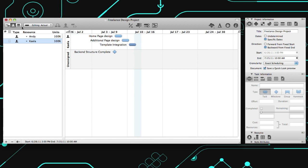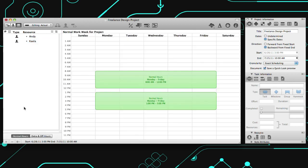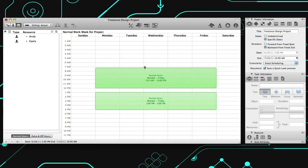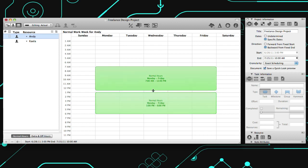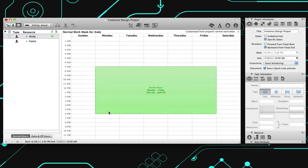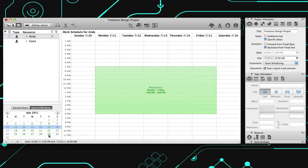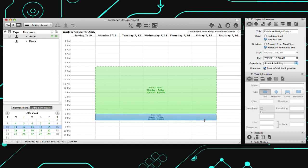Now you can switch to Calendar View to customize the schedule for the entire project and its resources. This will help to create a more realistic plan, taking off time and other variables into account. With the normal work hours for the project set, select a resource to modify the individual work hours. Or toggle the Extra and Off Hours button, then drag your cursor to add time.